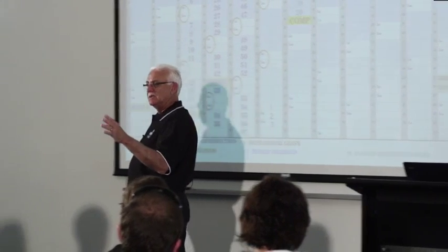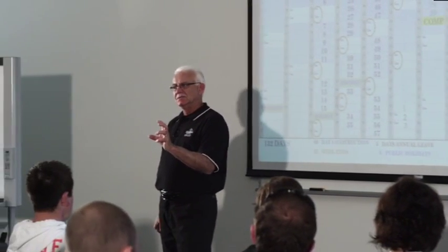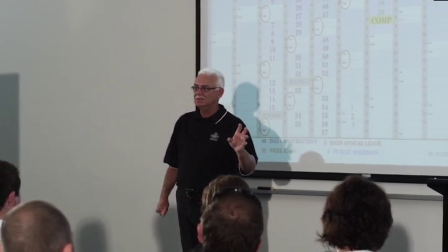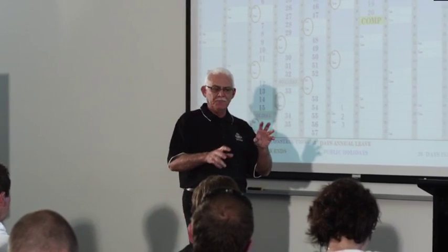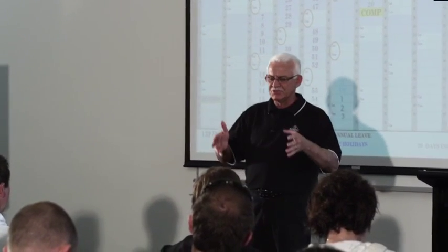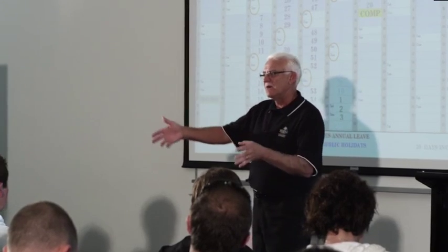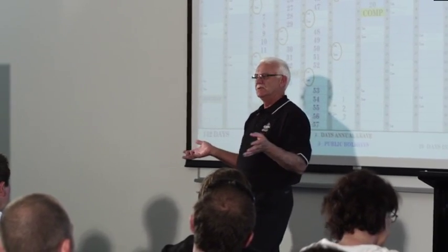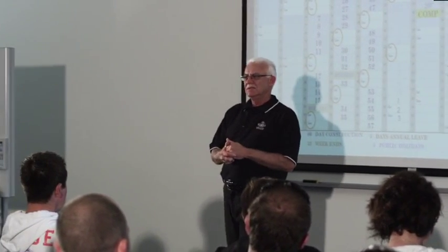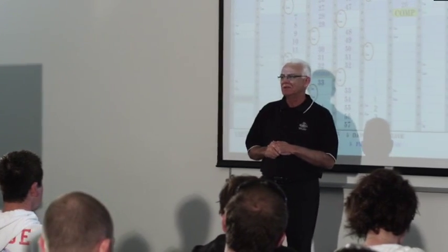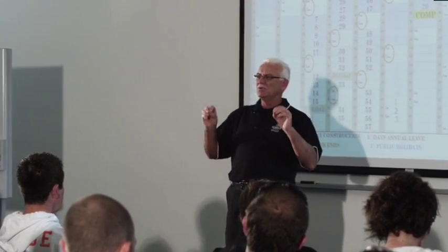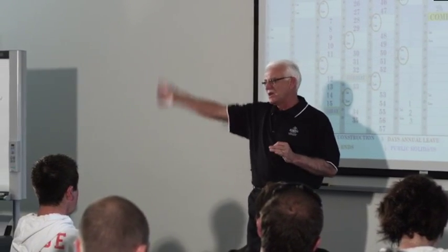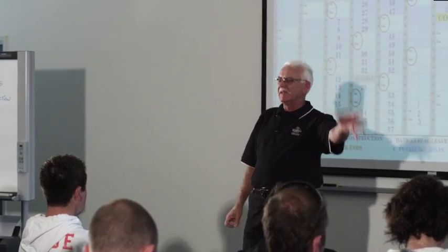So you put in a realistic amount. Government have said $50 a day is fine, because how they work it out is if you do go over and the owner has to reside somewhere, they look at the surrounding area and what would be the rental cost of living in that area. Let's say the rental cost might be $350 a week. Well, that's what the tribunal would consider fair. That you've allowed enough. If you go over your contract and they have to go and rent somewhere, you've allowed enough for them to rent.